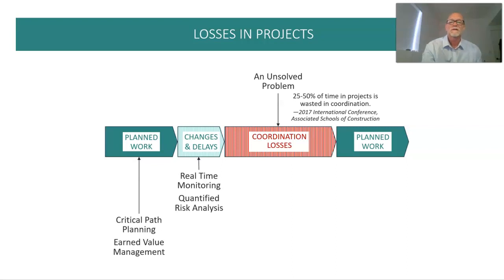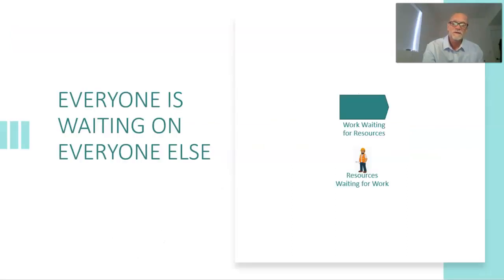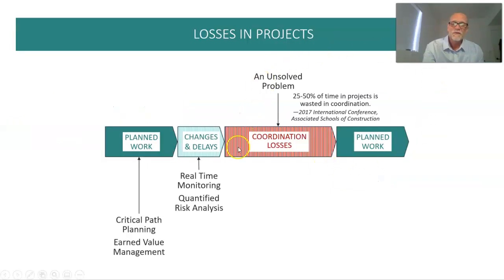So let's explore this a little bit. The end effect of this coordination loss is that you're going to see bow waves of work moving through the organization. Resource groups may be overloaded at one time, and so they're working hard to get their work out, and then the next week or weeks from that, they're underloaded and there's not enough for their capacity to do. Then a couple more weeks and they find themselves overloaded again. So you may go through these bow waves of work, which is really an indication that coordination losses are occurring and adding up.